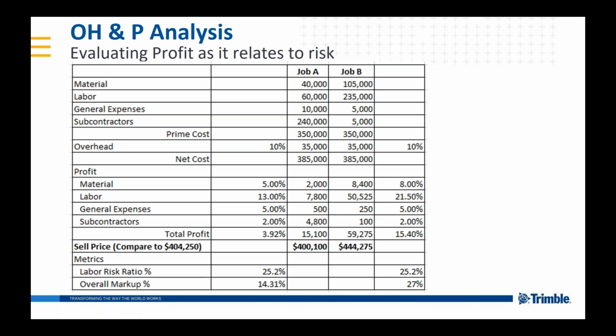Yeah, sure. I guess some examples of how job site conditions would change would be like, okay, so I went to the pre-job or the walkthrough, and this is where they told me my material laydown area was going to be. And I got to the job, and we started offloading tools and material, and my job site laydown area has drastically been changed or moved, and now it's no longer close to where my work is going to be. It's a long ways away. Now, okay, we got to look at it within reason. If it moved, but not by much, I wouldn't worry about it too much. But if it's a substantial difference, that's absolutely something that needs to be brought up.